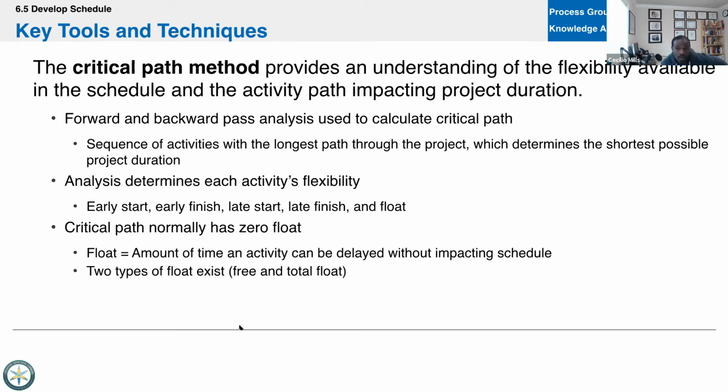All right, so critical path is all about figuring out, it's funny because it is the longest path, but it's actually the quickest that you can complete your project given no hiccups, right? That's actually the quickest you could do the project is the critical path. So it's the longest duration of activities throughout your project, all right? Least amount of float, normally 0.